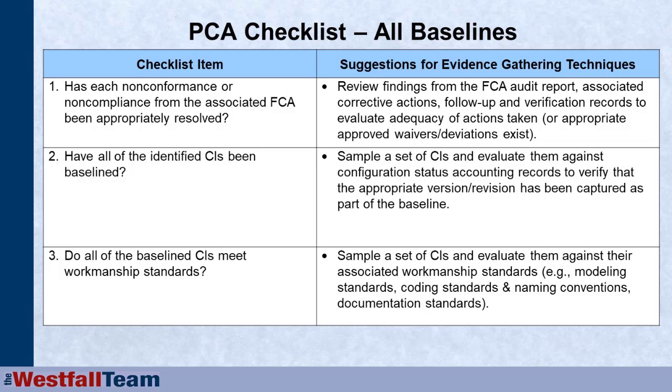Do all of the baseline configuration items meet their workmanship standards? Now, this you have to do as you go along. Nobody's going to worry the day before you're trying to ship the product whether the code meets coding standard or the design meets modeling standards. The documentation is in the right format. You've got to be doing this as you go along. I would not even wait till the baseline at the end of each phase. I may do some of this as in-process audits.